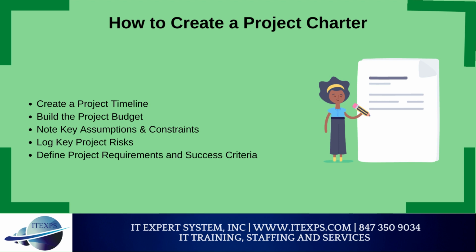7. Build the project budget. While you will go into greater detail when you create the project budget, here is where you want to get a ballpark figure on what project costs you expect. Define the budget for the project and who will have spending authority. Include the estimated costs for the tasks you have defined, but be aware that new project requirements and tasks will require adjustment of this budget.